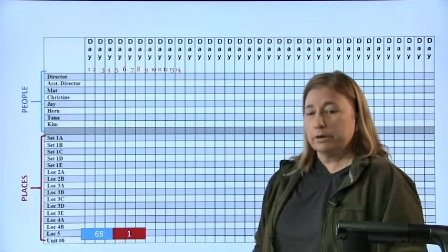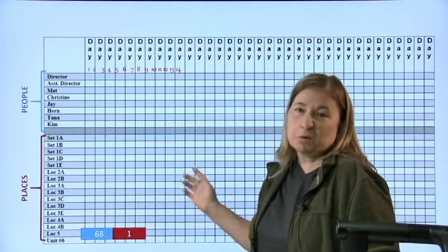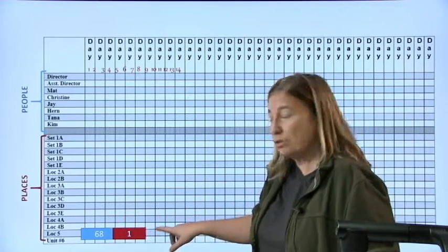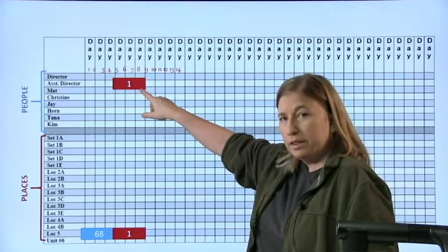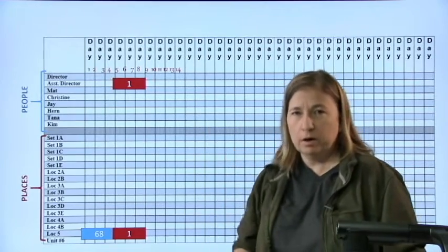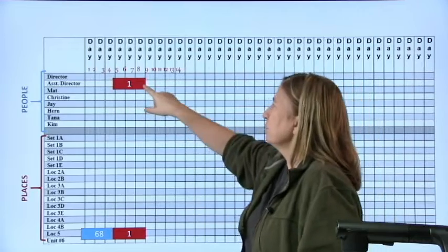Now, why was I doing that? Because I was Robert Altman, and I wanted to get started right away in filming task 1, and this is saying, well, let's pretend that it's 3 days long. I would mark then the next 3 days. I do need to remember that task 1 also requires the assistant director. Look this up on table 1, because I'm pretty sure it'll be true for you, although it won't necessarily be 3 days.